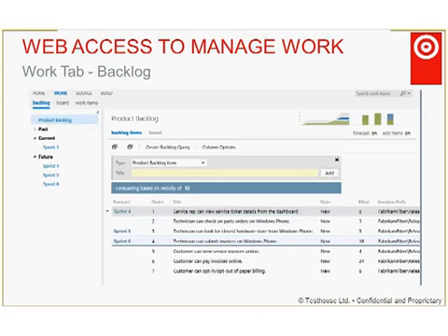And of course items in the future sprints can have their orderings adjusted as the project progresses. And again, against each item we have an effort required to do that work, so you can gather as many items together as fit into the available effort of the team, so you balance the work out over the duration of the project, so that each sprint has a similar amount of effort to do its work.